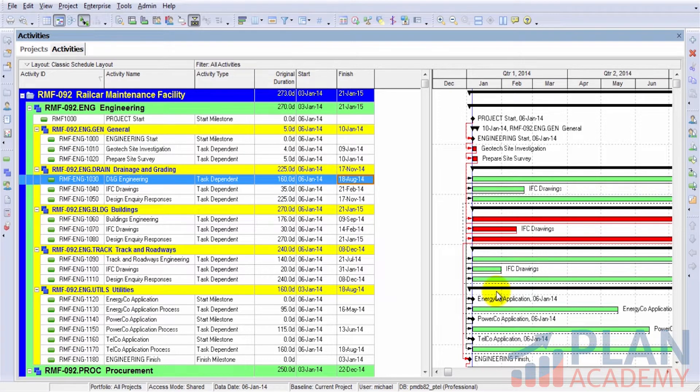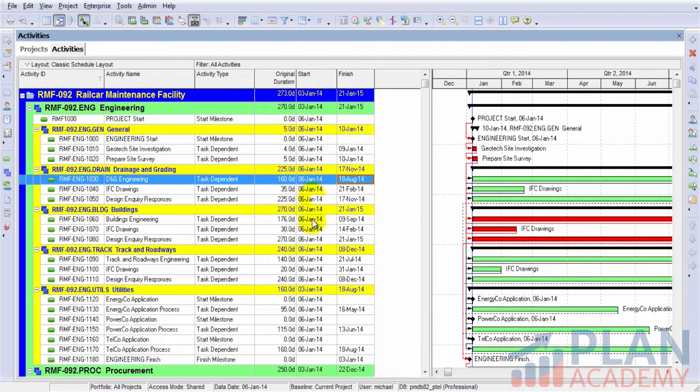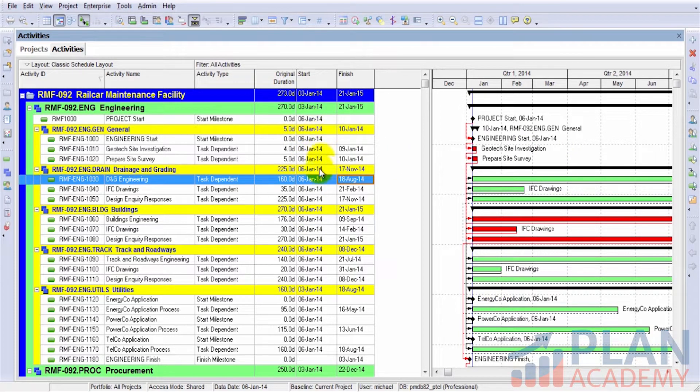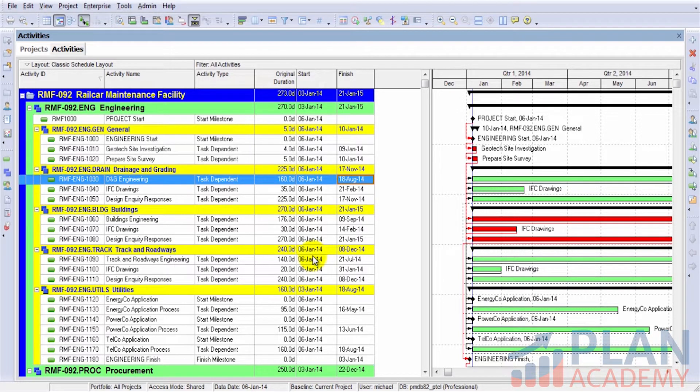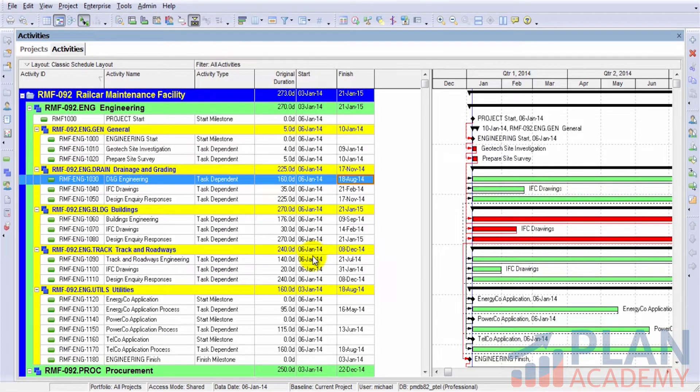The scheduler assigns start and finish dates to our project. We can see this in our date fields as well. Every activity has a start date of January 6, 2014. That, of course, is the start date of the entire project.